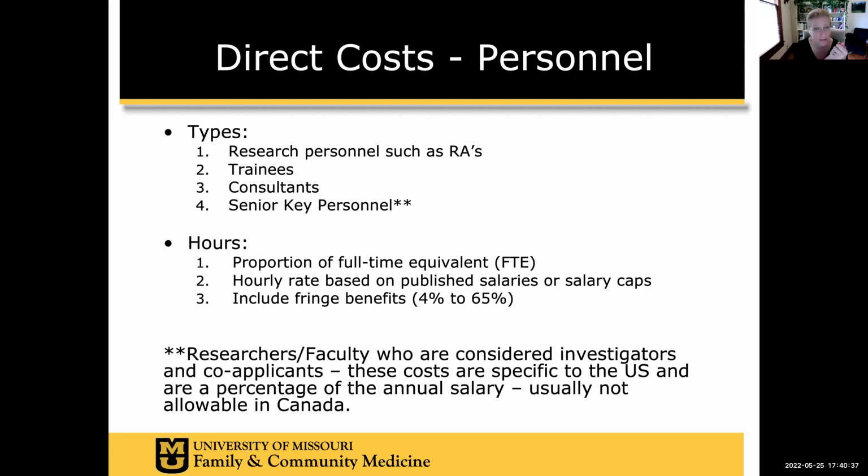You need to know what the benefits are. What I tend to do is figure out what the maximum benefits are and add that onto the salary regardless. So if I do manage to hire a casual RA, great. But if somebody then says, hey, I've got so-and-so and I need like 0.5 FTE of their salary covered, but they are a permanent position, I need to make sure I've got the benefits portion covered. Benefits is one of the things that trips people up on calculating their personnel and their RAs.